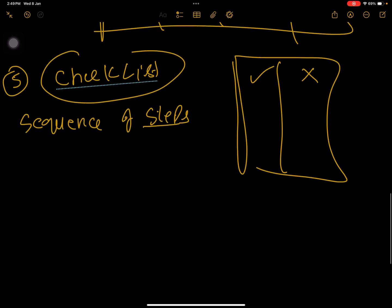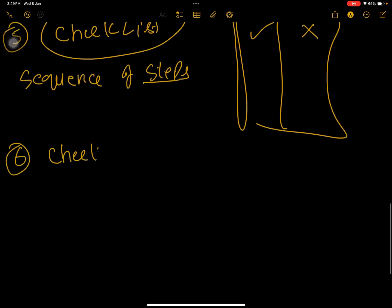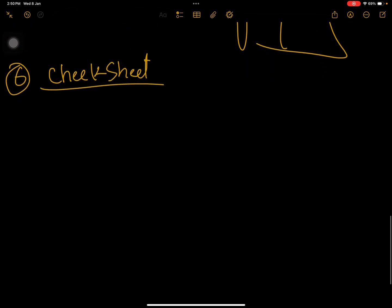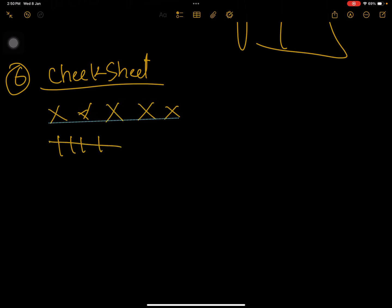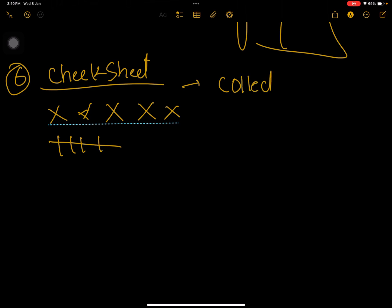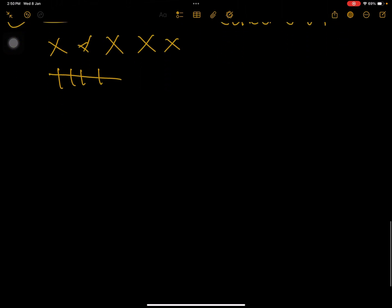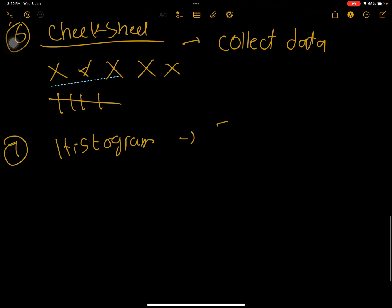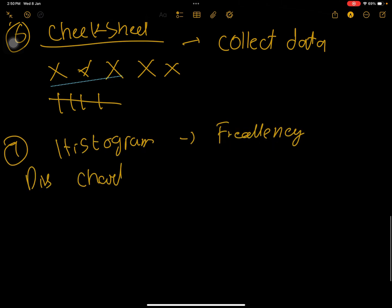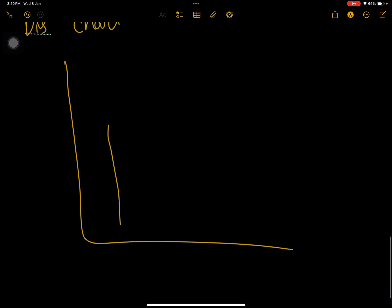Another type is check sheets. Check sheets are used to collect data — for example, from sampling — and count down defects: one, two, three, four, five, in the form of a tally sheet. This is the check sheet, used to collect data. You can then plot the data collected through check sheets on a histogram, also known as a frequency distribution chart.